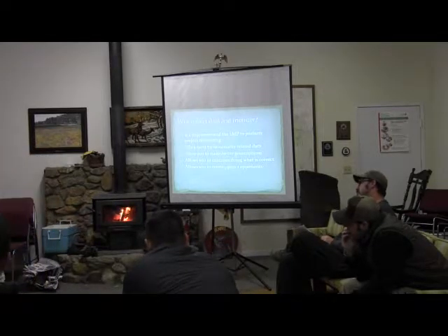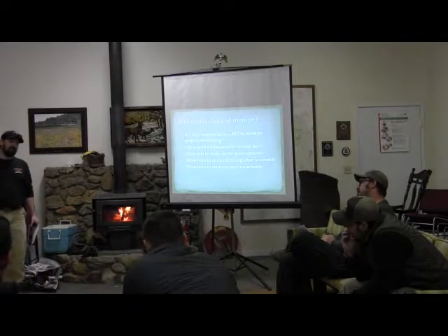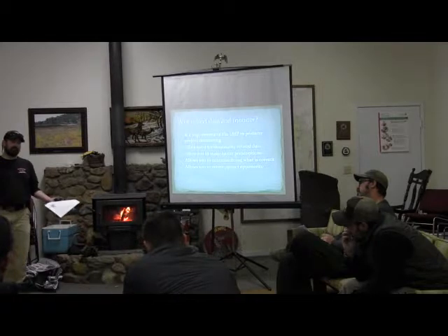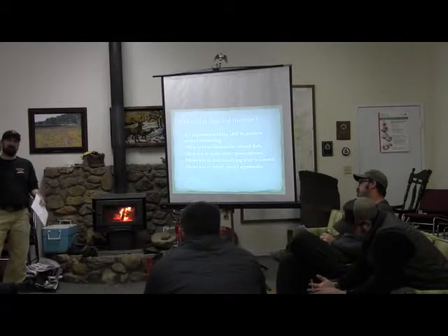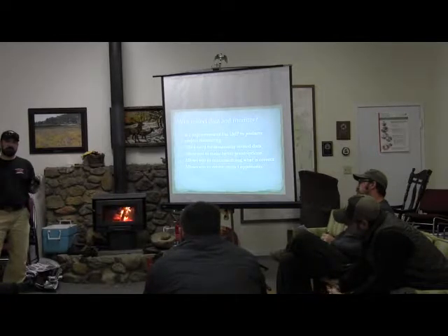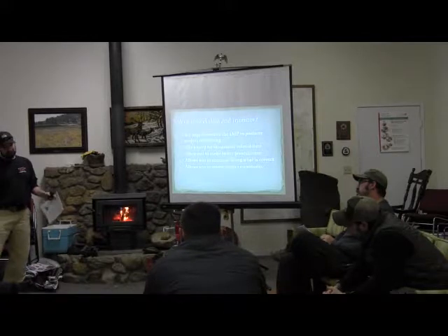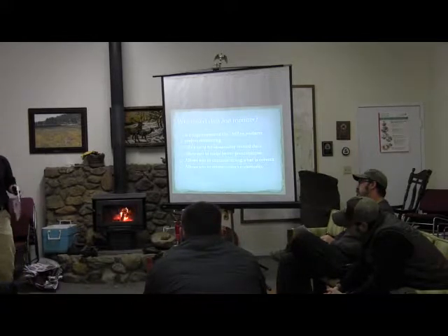I would say for the burn boss, element 21 of the burn plan is the monitoring. At the very least, the burn boss has to make sure that the monitoring plan in the burn plan is being followed. A lot of times there isn't one, so then technically they don't have to do anything.